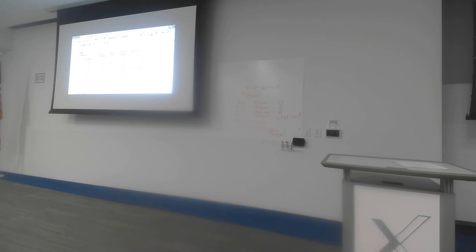The different activities crashed is B, which I don't know if I've maxed that out. B, no, I've got 2 days to play with there, so I'm going to leave it like that. B, comma E, which is the last day I can crash E with. So I'll put an asterisk beside that because I've crashed it 3 days already and I can only crash it by four. So B and E together cost €9.